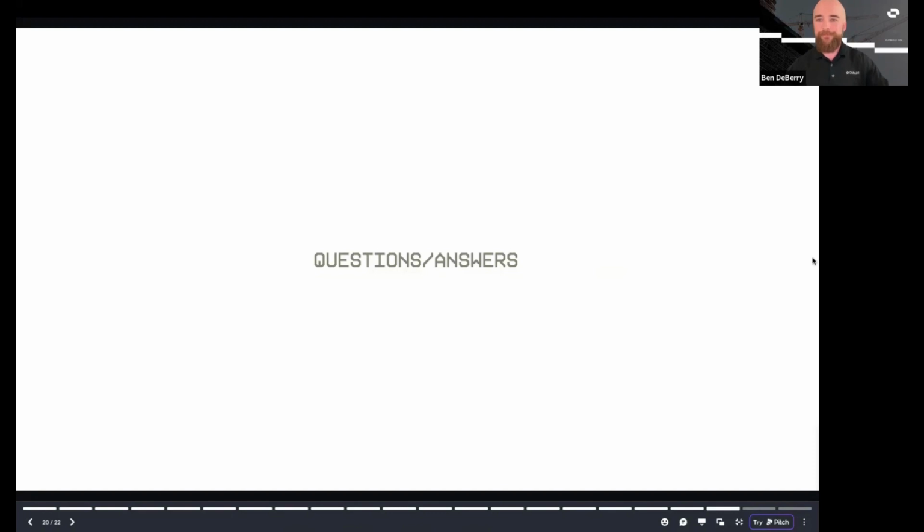All right. And Ben, I'll just answer your chat. For those analytics, is there a way to automatically get that weekly, monthly? So as far as the analytics dashboard, there's not a way to export a weekly or monthly report currently. But if you are looking for weekly updates, you can get the weekly report for the week commitments and the week closing. So when you commit your weekly plan, you can get an automatic report sent out letting you know what has been committed for the upcoming week. And then after the week is closed, another report can be automatically sent. So you do have those options right now.